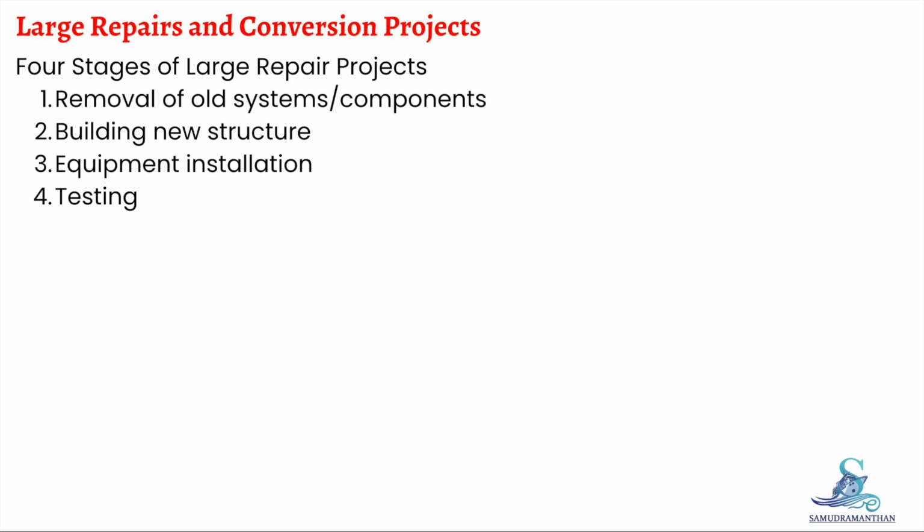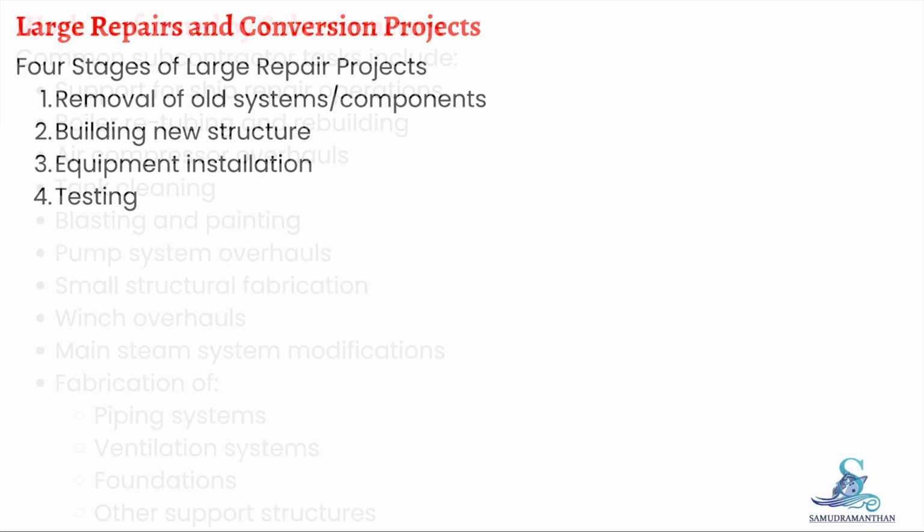These projects generally follow four major stages: removal of old structure or systems, building new structure, equipment installation, and testing to ensure proper function. These large projects significantly change the ship's design or capability.